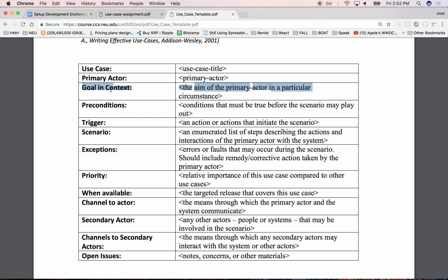Presumably we would give scores of how complex each one of those tasks are, and depending on those points that we give them, and depending on past experience of our velocity, on how many points we can deliver every sprint, we can start thinking about predictions on how far we think we can get done, right? And with negotiation, we can come up with these amounts of features for phase one, right?